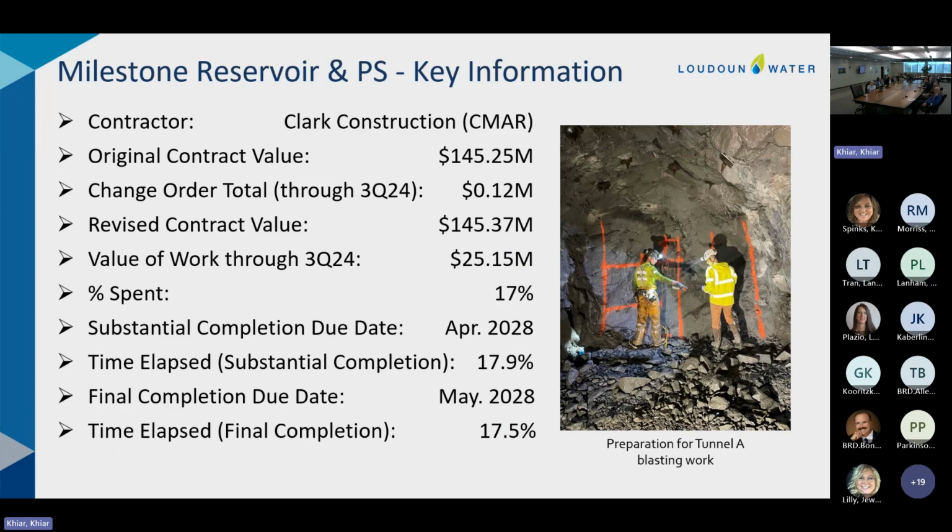Here's some of the stats on the project. Just roughly based on percent spent and time elapsed, you'll see that we are proceeding actually well ahead of schedule, probably about a month by my estimation. Substantial completion due date remains April of 2028.